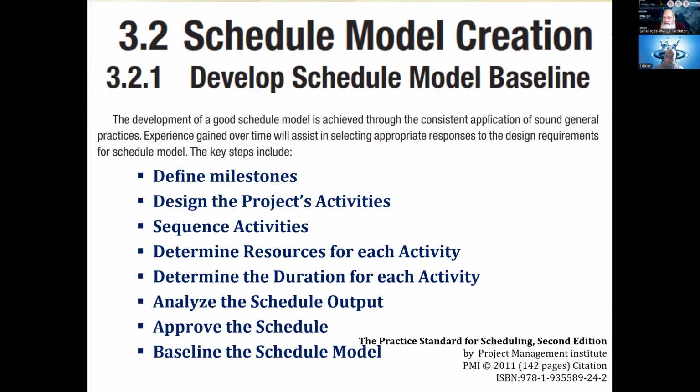These smaller events are the start or finish of every activity. Means you say this is a starting point of activity A, so this is an event. The moment the activity A should start is an event. The moment the activity A should finish is an event. So that means every activity is at least associated with two events.